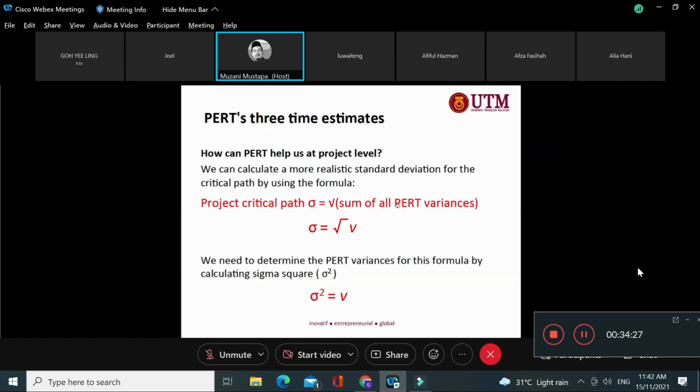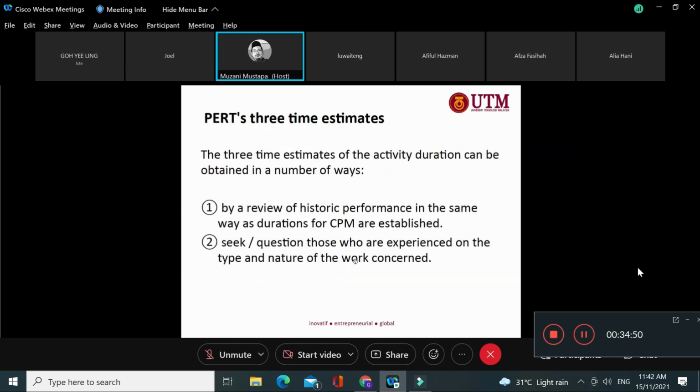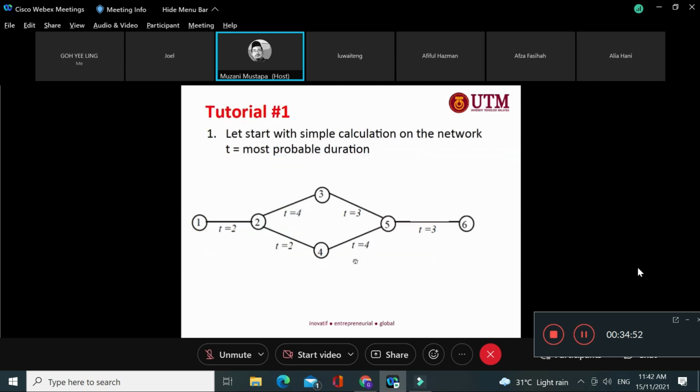That's why each activity has a 3 point estimate. We put the estimation in the equation, we get TE. Then for that TE, we calculate the variance, so we get sigma, or the standard deviation, right? Okay, now move to the next one. This is the same way.